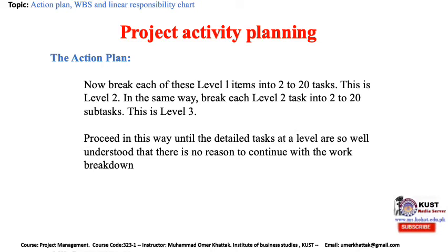It is important to be sure that all items in the list are roughly the same level of task generality. In writing a book, for example, the various chapters tend to be at the same level of generality. The individual chapters are divided into finer details. Indeed, subdivisions of the chapter may be divided into finer details still. It is difficult to overstate the significance of this simple dictum. It is central to the preparation of most of the planning documents that will be described in this chapter and those that follow.